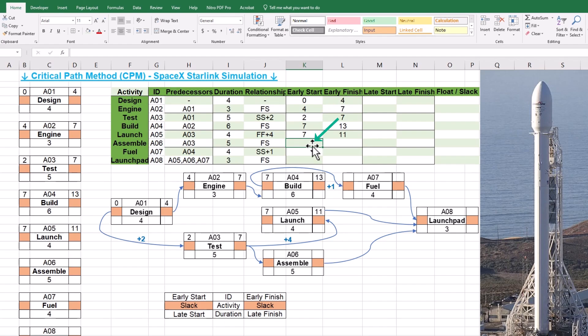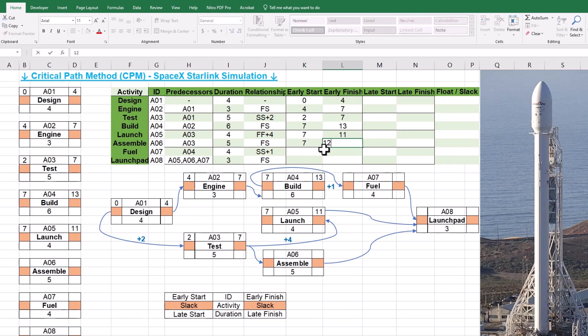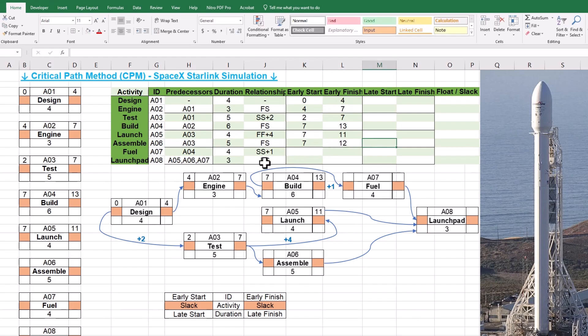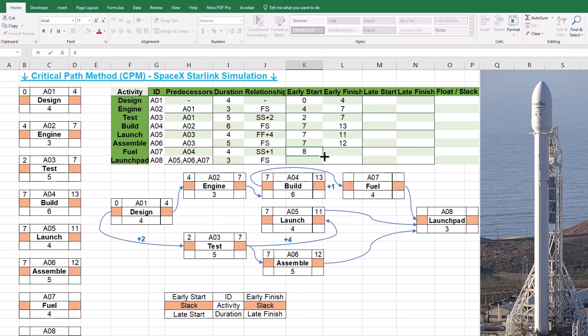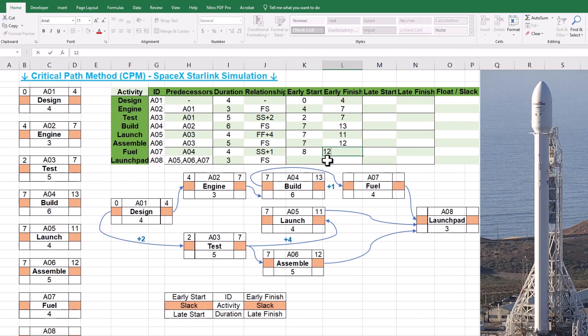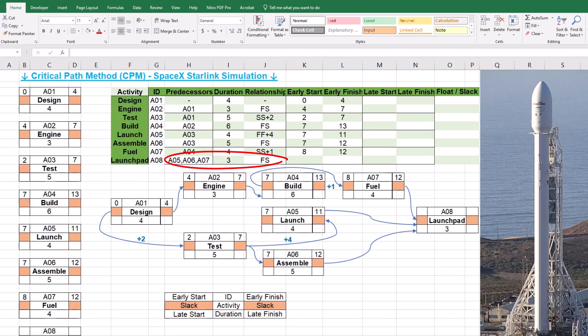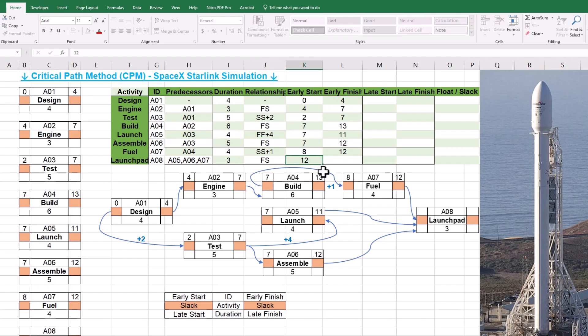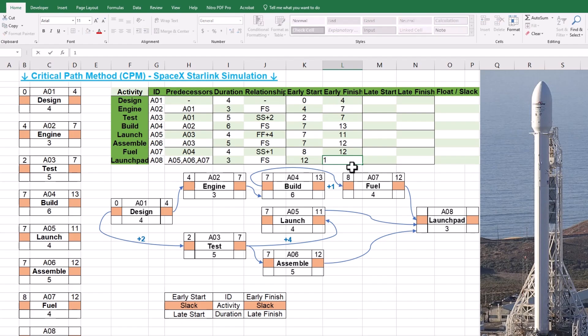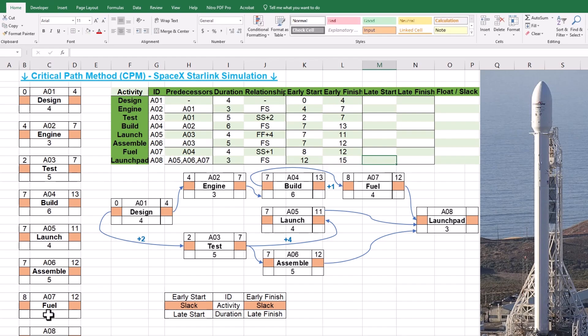A6 will have the same early start date as the early finish of A3. By adding the duration of 5, the early finish date for A6 will be 12. A7 is dependent on A4 with a start-to-start relationship and lag of 1. The early start is 8 and with a duration of 4, A7 finishes on 12. A8 has three predecessors of A5, A6, and A7, all of which have finish start relationships. In the forward path, we choose the later date of 12 as the early start of A8. Therefore, this activity and entire project finish on 15. Please pause the video for a moment and control calculations one more time. We have now completed the forward path and linked the early start and finish dates of all activities with the project data table.